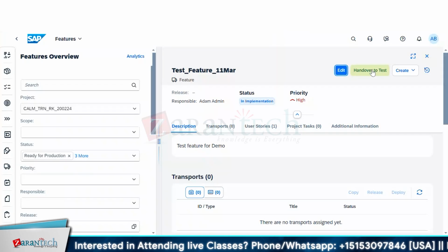That I understood. What I'm talking about is that the packages will be different. This user story will repeat again. Correct. Okay. It has to be consolidated. If it is independent, you can move the changes to pre-production for those user stories, up to that UAT. So that UAT can be planned consolidatedly and done. It depends upon what kind of complex changes you are involved in.